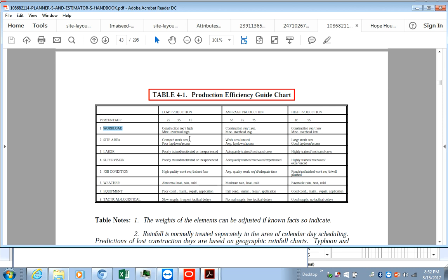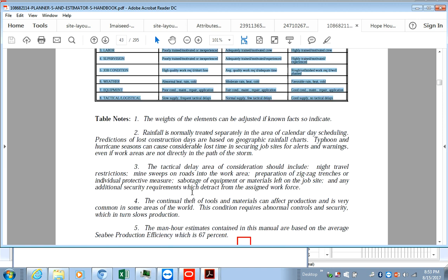Scaffolders came in, or the temporary works guys came in, and they weren't necessarily as skilled. Say for instance you prepare a package for 100k, and then another subcontractor comes with a lower bid of 80k. The first thing that will jump at you within their bid submission will be, are the guys they're getting on site skilled enough? Will you get low productivity, average or high? All of these are different rationales or methodologies that you would have to take into account in order to achieve the objectives and deliverables of that particular activity.